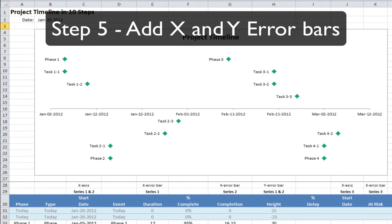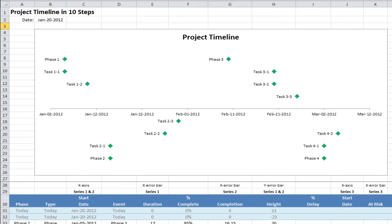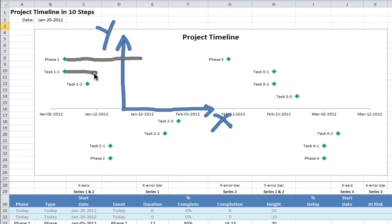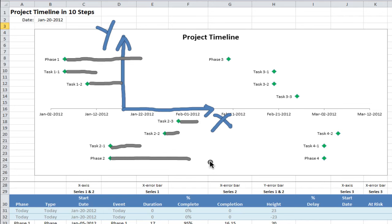In step 5, we'll add grey duration bars to show how long each event takes, and also blue drop lines down to the axis. The way to do this is using X error bars and Y error bars. But first, let me just remind you which one's which. So this one is the Y axis, and this one is the X axis. And what we're looking to do is add grey duration bars this way, for the phases and the tasks, and like so for each task. Then we'd like to add blue drop downs from the markers, the event markers down to the axis, and this way as well.